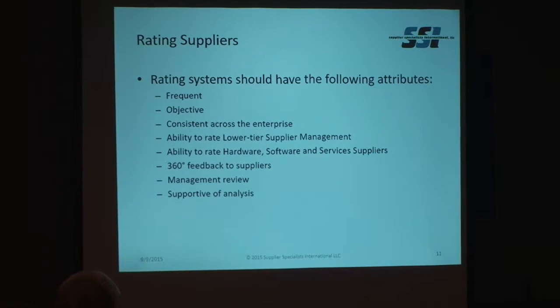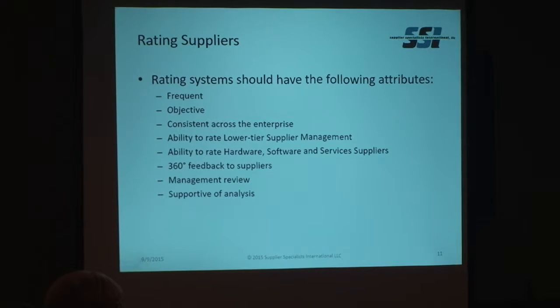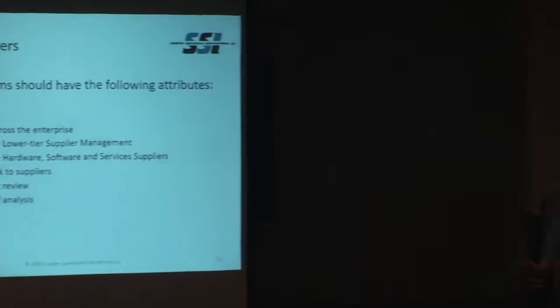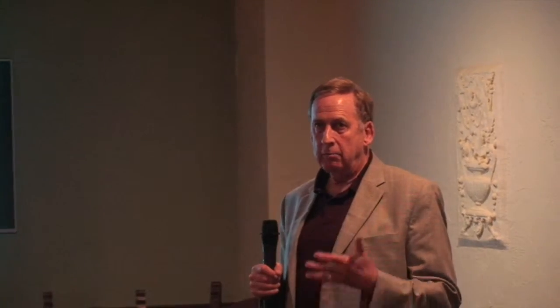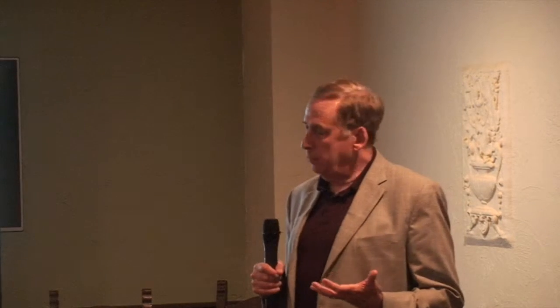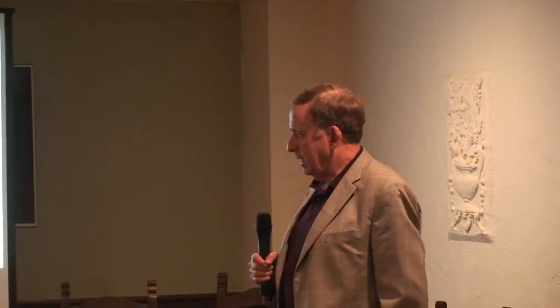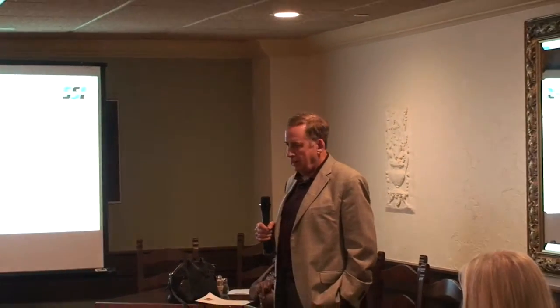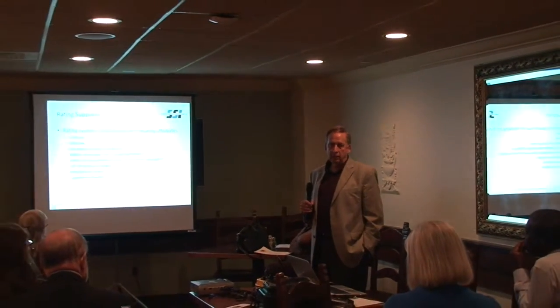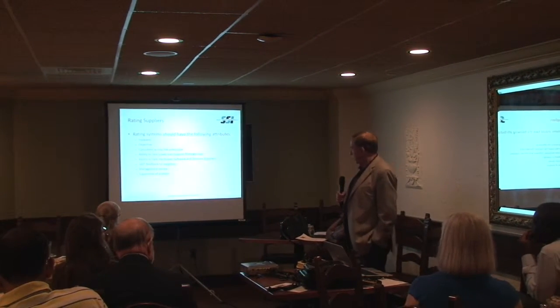I spent quite a bit of time my last tour of duty at Northrop developing a supplier rating system that's used throughout the corporation. And I think some of the key things that are really important when you're trying to manage a supply chain and also to look out for potential problems, you need to do ratings on a frequent, periodic basis. I'd really recommend quarterly. I think that's probably the right amount of time. Monthly is a little bit too demanding. I think if you do it annually, too many things can escape your span of control.